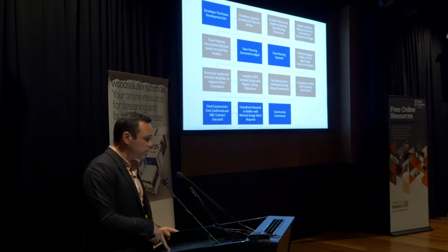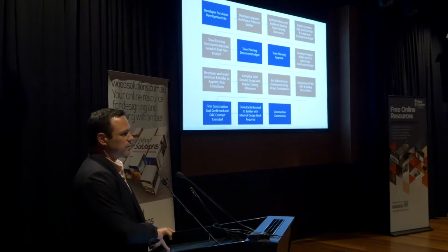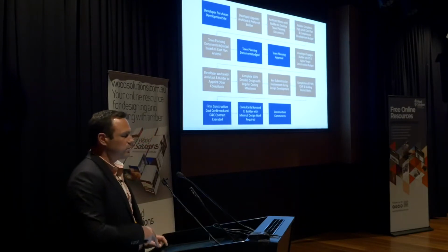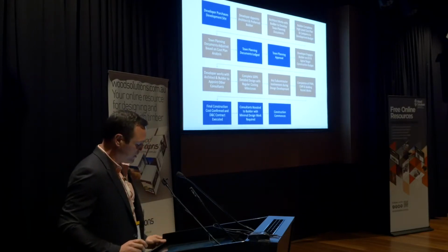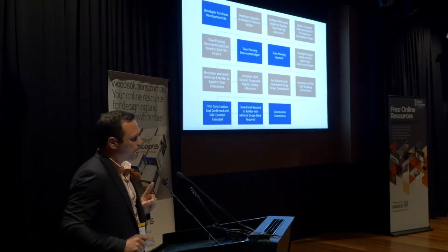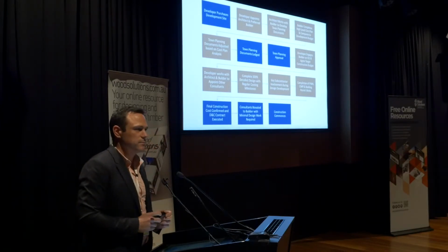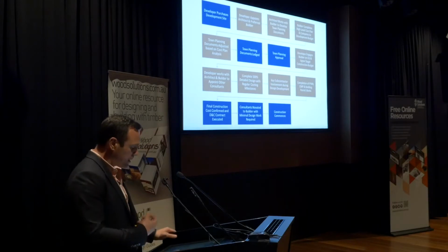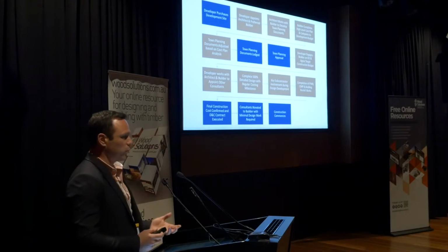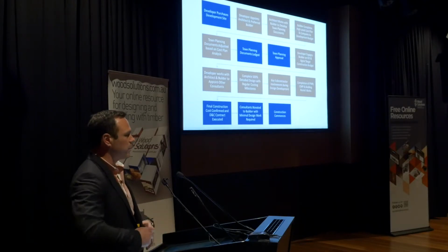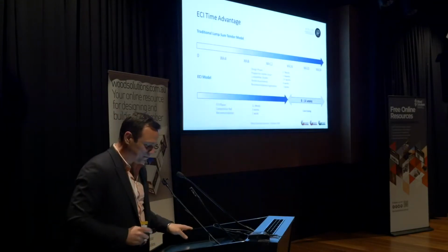So incorporate that into the process, because right at the end when you've got a final construction cost confirmed and you're still signing a D&C contract, the contract doesn't change. It's still a D&C contract. So when you actually sign it, you start not quite the next day, but the lawyers might, rack up some fees going back and forth a bit, but you actually sign a contract and start construction, which benefits everyone. And then the consultants are novated across and construction commences, and generally there's minimal design work to be required because we've aimed for 100%, and everyone, that novation's a really happy time because everyone likes each other.